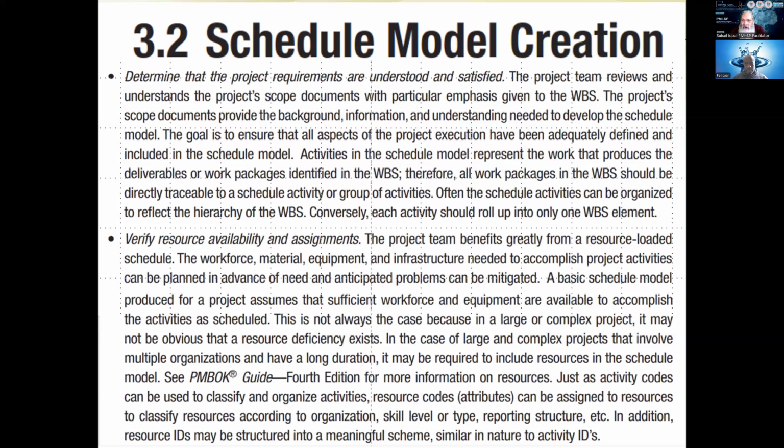Meaning, if you look downwards from a work package, you would find it leading you to certain activities at the bottom level. And you must satisfy yourself that all those activities in that work package are really necessary to do that job. As I said, no extra work or no work left behind. Exactly, you have to meet the requirement of the work package and the work breakdown structure.